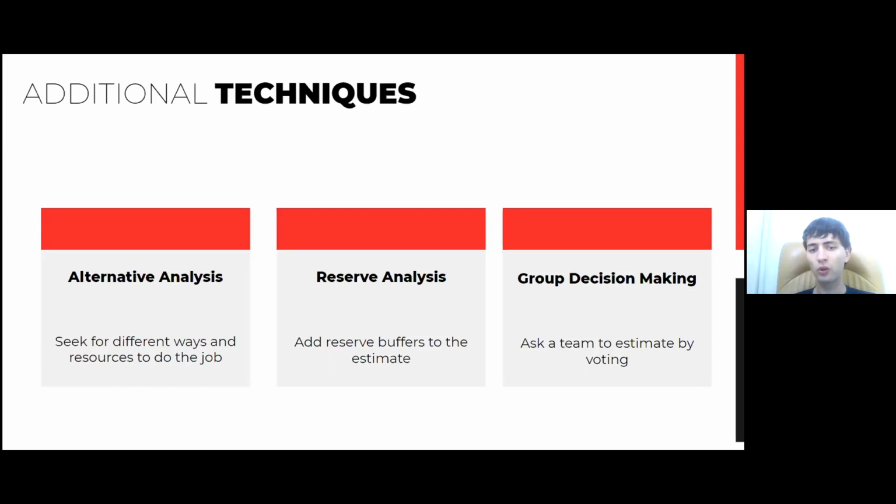This one goes for some things that we cannot foresee right now, but we already know that for a project with this complexity and this size, we typically get another 5-10% of time in the end just to polish the project and to clean up all the things that suddenly happen.